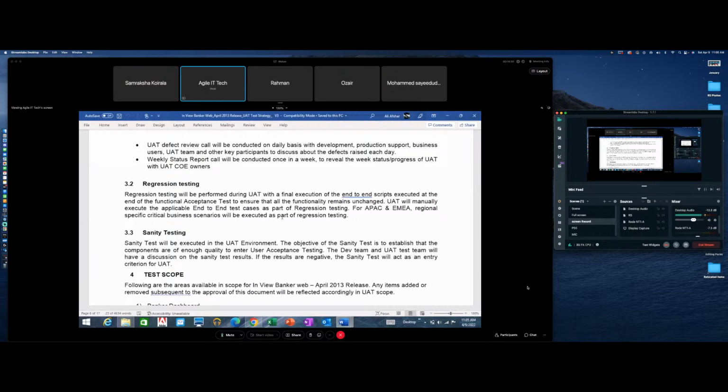So let's say you did everything as you did, and you had a really high test pass percentage. If you had a 90% pass percentage through the full execution, which is very rare, right? 10% of 6,000 is what? 600. So your total number of test cases you would have executed by the time you were done would have been 6,600, right? With a 90% pass rate, correct?